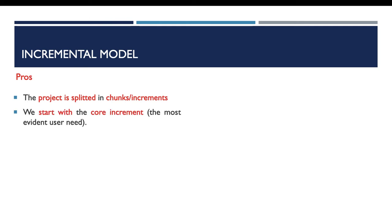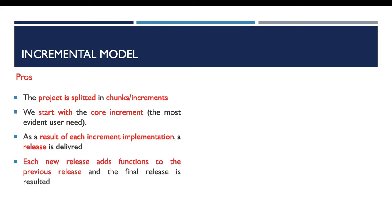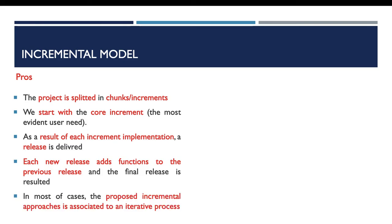Now for the incremental model: the project is split into chunks or increments. We start always with the highest priority increment, and as a result of each increment implementation a release is delivered. Each release adds functions to the previous release and composes the final result. In most cases this model is used together with the iterative model — the whole project is split into increments, and to implement each increment we use one iteration.